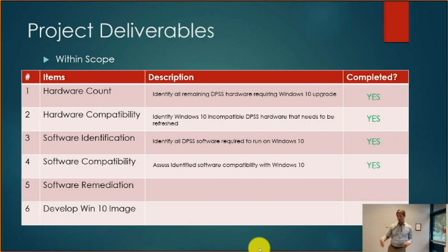And also your team, Chris, because we did, in fact, you want to tell us about how we had to remediate some applications? Yeah, some of the applications were really old. One of the good things is during the time that this project was going on, we were rewriting legacy apps. So when we came to this portion of the project, the reason why the UAT and the pilot were starting the same day was because by that time we didn't have a constraint of JavaScript having to remain at a certain level, 7.71 to be exact. We could now allow that to be taken out of the GPO.